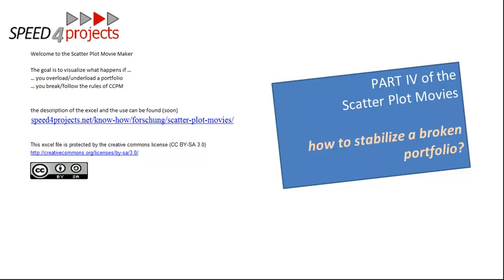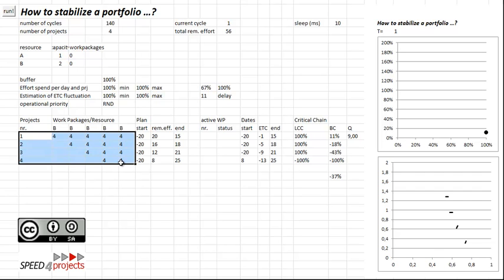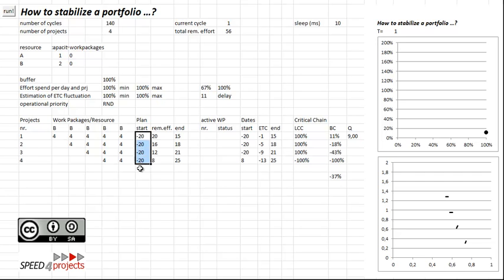So let's have a look at the portfolio. It's a very simple portfolio with just four projects at different stages. On a few of them, there's already some work done, some stages already finished. But they're all started at the same time, and that's already a break in Critical Chain rules. So this portfolio is already screwed up a lot.